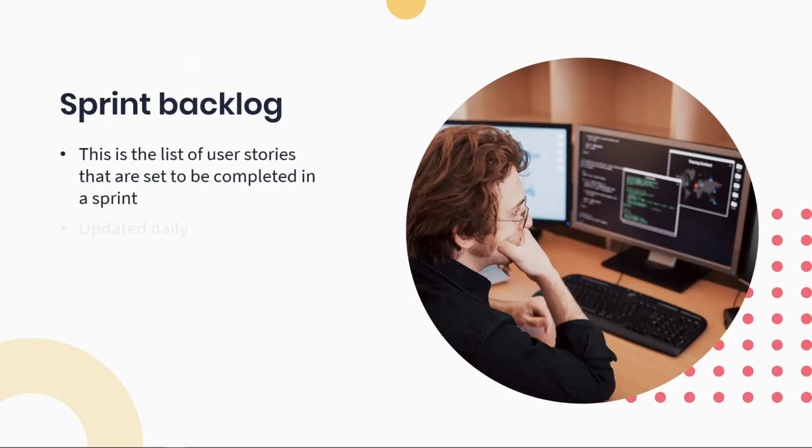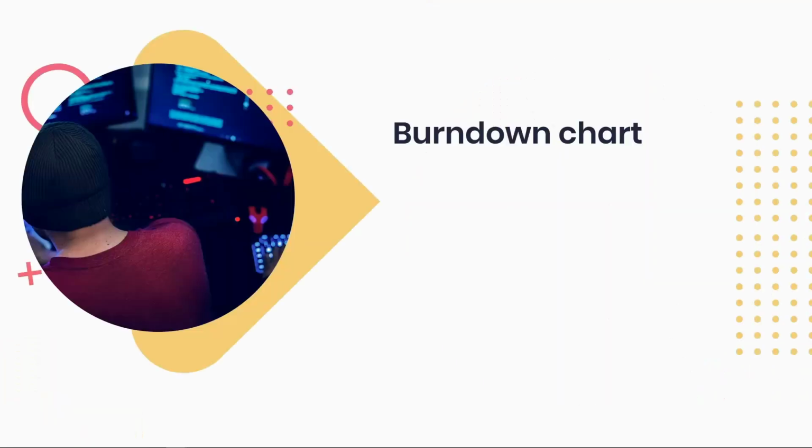This list is updated daily, and the work is not explicitly assigned. Rather, team members take up work on their own. A schedule of the work that remains at the end of the day is updated into the sprint backlog.